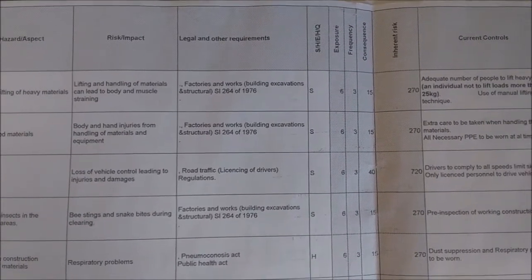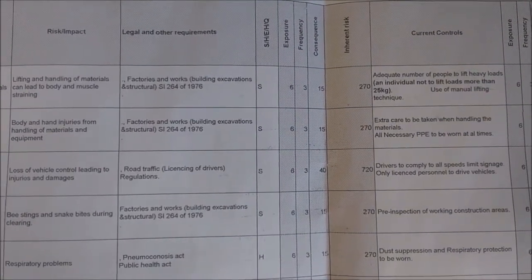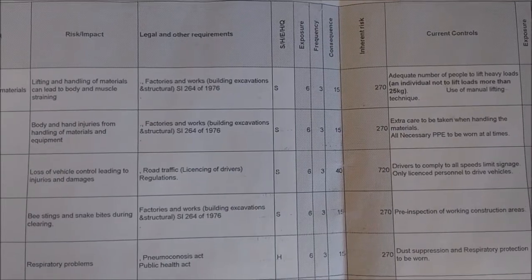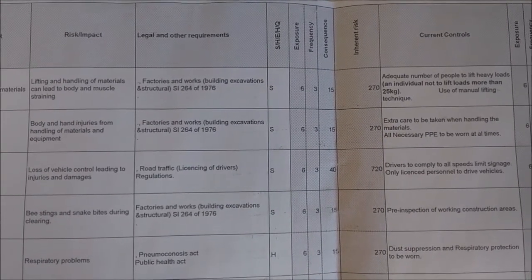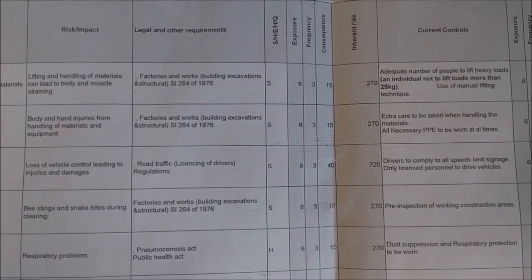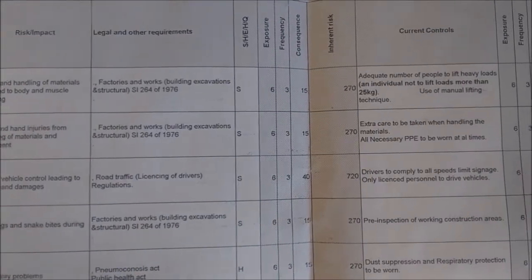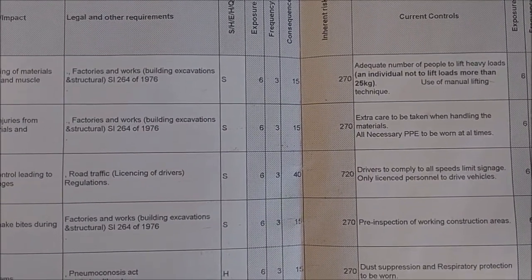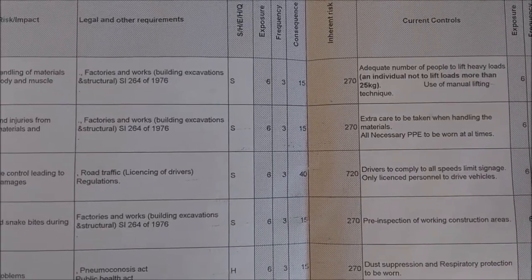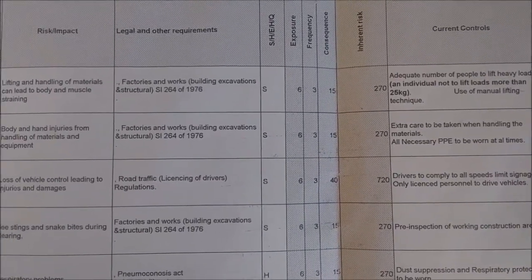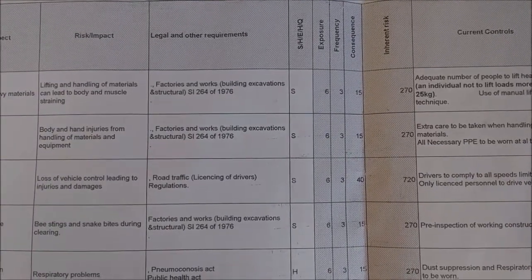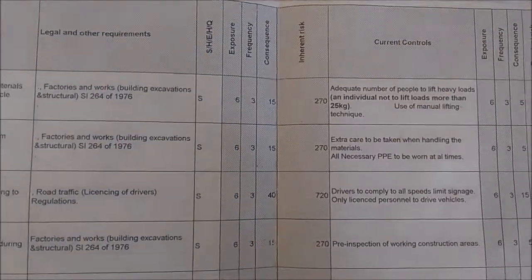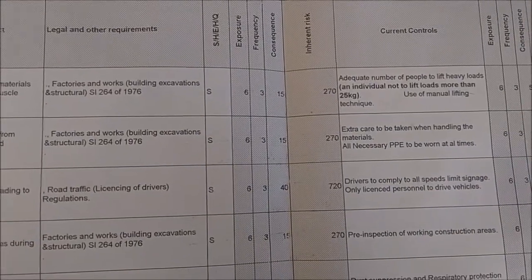The fifth column has legal and other requirements — these are the laws that relate to the particular activity and the hazard and risk involved. That is one reason I like this template: it includes the legal and other requirements so you can also comply with the laws of the land while doing your project or work. The next column is denoted by S, H, E, and Q — Safety, Health, Environment, and Quality — indicating whether the issue is a safety, health, or environmental issue.